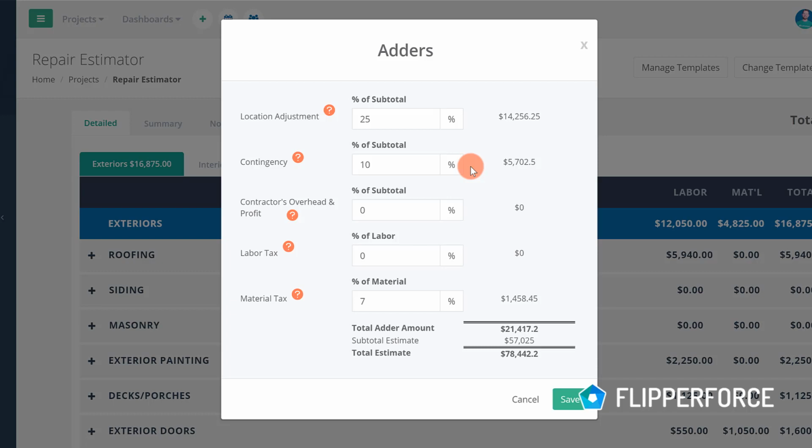However, if you have little to no construction experience or experience estimating costs, and/or maybe you haven't even seen the condition of the property, you will likely need a much larger contingency to cover any kind of estimating errors, omissions, or unforeseen repairs on the property. So plug in the amount of contingency percentage you are comfortable with, and then that percentage will be added as a contingency budget to your estimate.